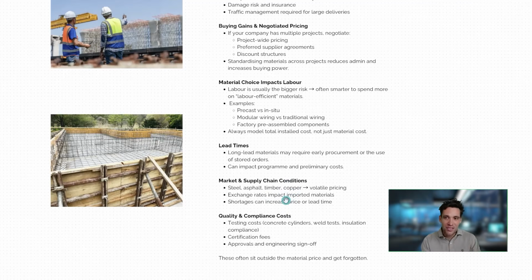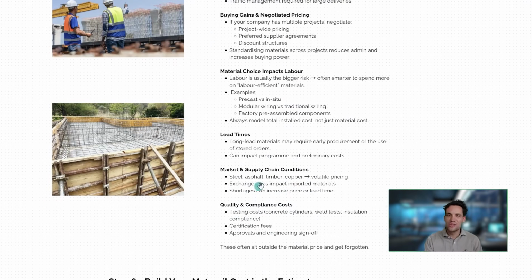For example, they're locking in certain rates with you and they're happy to hold that validity to when you actually need to order the materials and the products. You just have to think about that risk, because with things like Ukraine and the price of aluminium, or COVID and what it did to international shipping out of China, it is something you have to consider with materials. Previously I was saying that materials have a lot less risk, but there are these market conditions that generally you don't get with labor and subcontract costs. With materials, you can get quite rapid and volatile price changes. You have to consider both how you're de-risking that to your clients and how you're managing that with your supply chain, because you don't want to get caught in between.